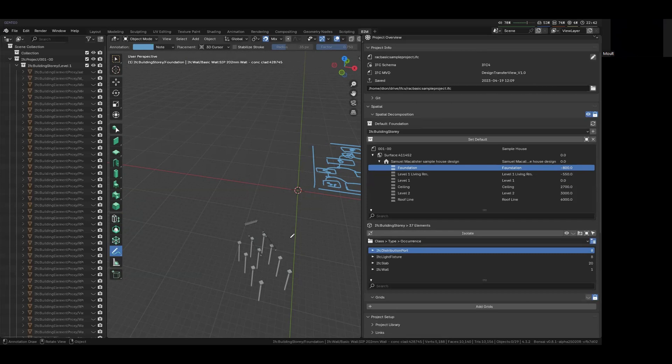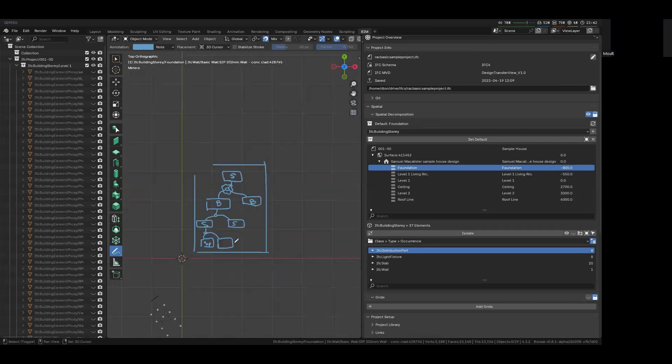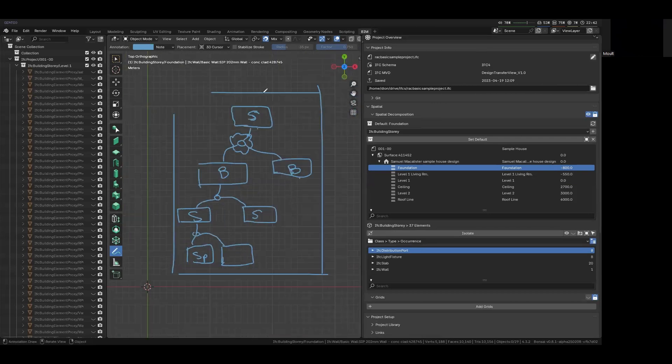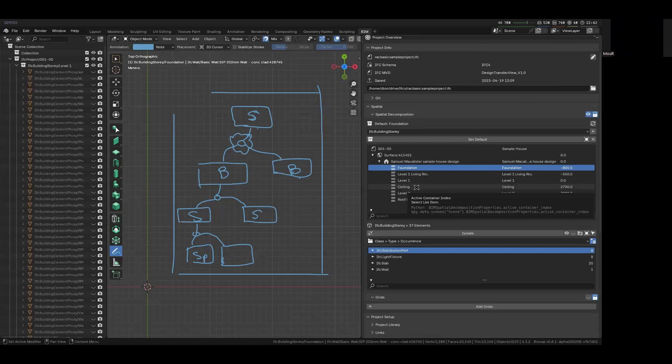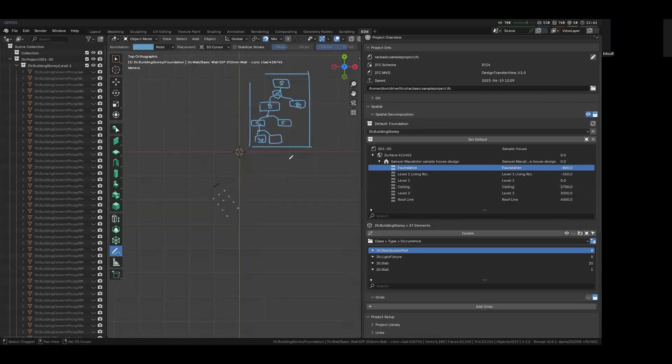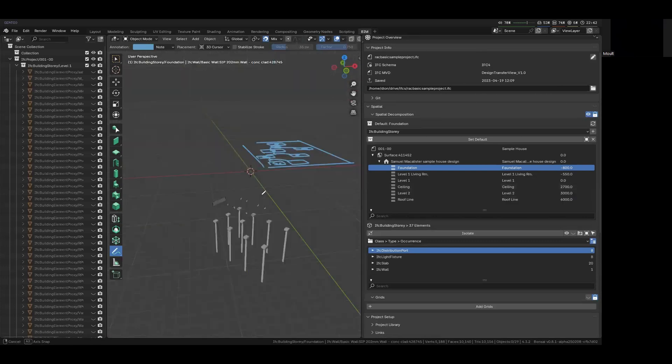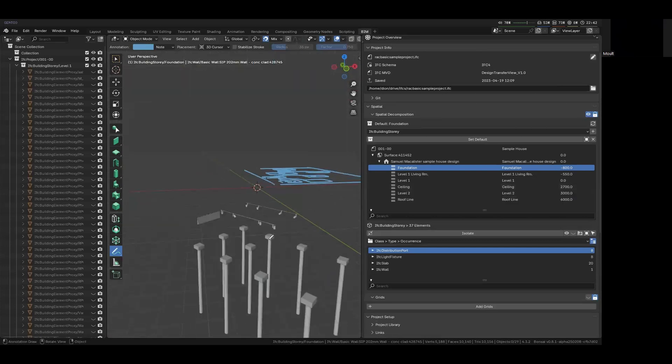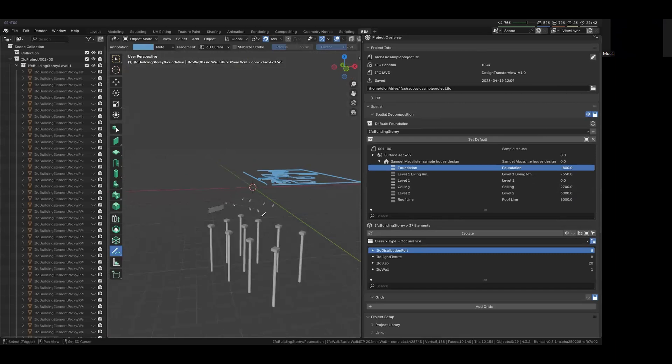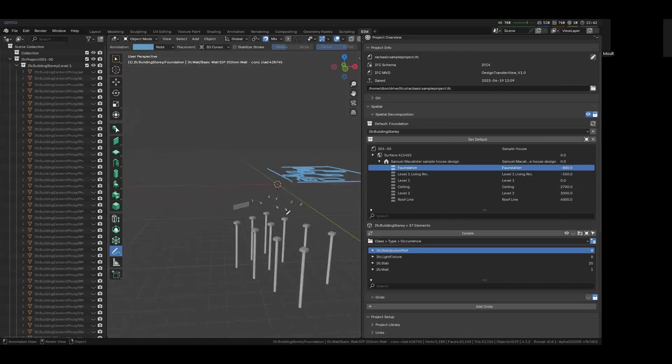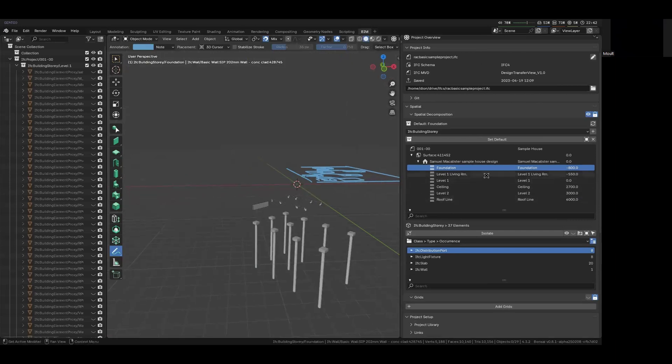So if you wanted to do any sort of work breakdown structure or cost breakdown structure or some sort of elemental breakdown for carbon takeoff or any sort of facility management asset location breakdown or some sort of asset location code. But all of these things need some sort of hierarchy. And so getting a hierarchy that is really well vetted means that whenever you create a model breakdown or a cost breakdown or a work breakdown, they all can link off these highly controlled and audited locations.